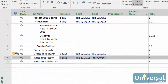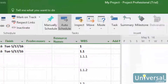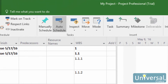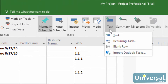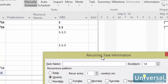Recurring tasks are tasks that are worked on and completed at regular intervals. To set a recurring task, go to the Task tab, then click on the downward arrow below the Task button. Select a recurring task from the drop down menu.